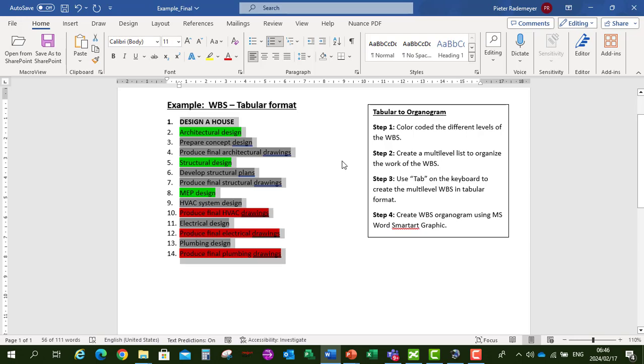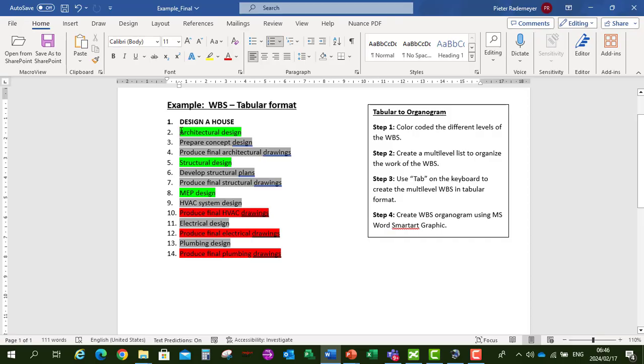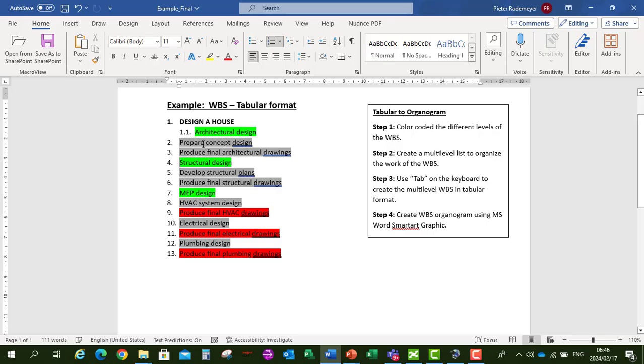Then we're going to create our different levels in the Work Breakdown Structure by starting off with our Architectural Design, which is our first level. I'm going to use Tab on the keyboard. Tab once. Then Structural Design, also our first level. I'm going to click Tab on the keyboard. And then Mechanical, Electrical and Plumbing. Again Tab once to create our first level in the Work Breakdown Structure.